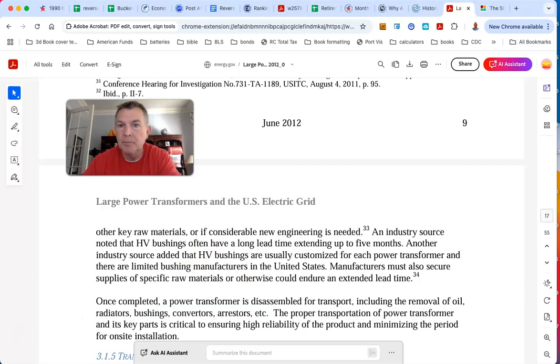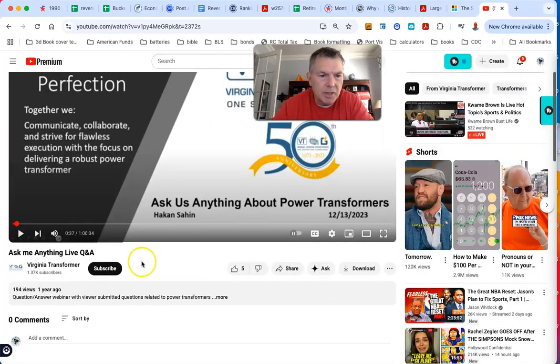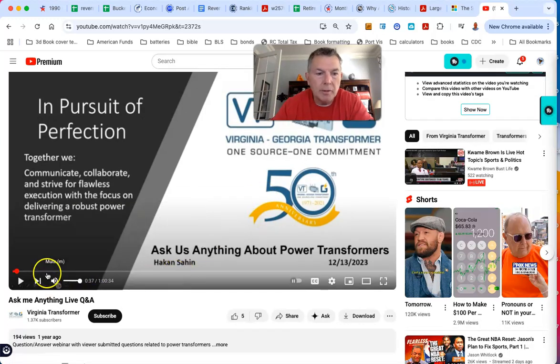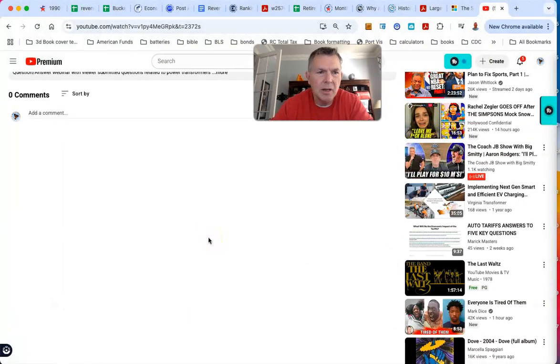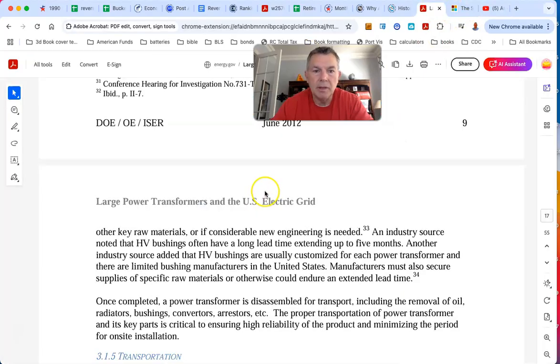Interesting. In fact, you want to hear something? Watching this webinar by the Virginia Transformer, Georgia, I forgot what it's called, VTGC, I can't remember. And the dude was saying, let me show you on lead times, crazy. The lead times are now over 24 months, the guy was saying. It's getting worse. This is in 2025. I guess I didn't comment on it, but I watched this whole video, and a lot of this is well beyond my comprehension. But I was like, damn, dude. This is crazy. All right, let's keep going here. I mean, this is today, 2025. The lead times are much worse.